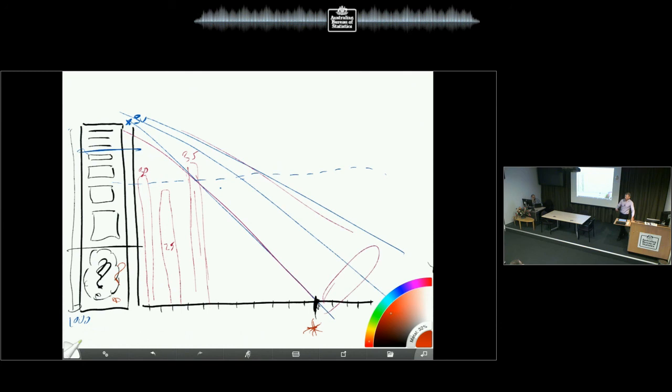So it's a lot easier to go to a stakeholder with this empirical data and visualizing the way the work is flowing this way. We can also say, well, by this date, what are we likely to have? Well, on average, it's going to be somewhere around here. I'm pretty certain we're going to do this. Definitely certain we can't do that. And you know what? Maybe we can do this here. So we're visualizing the work, and so the product owner can use this as a tool.